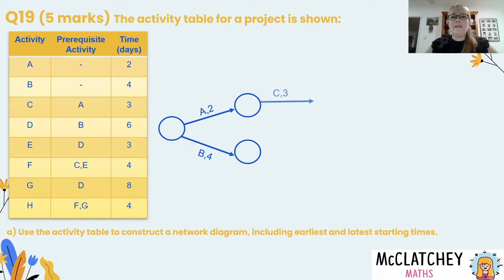Now our next activity is activity C. As we can see in the table here its prerequisite activity is activity A. So it needs to come out of the vertex that ends activity A. Then if we're going to move down as well we're going to have a look at this one down here, activity D.